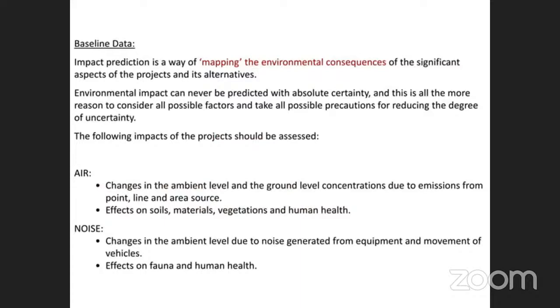physically counting the number of vehicles passing through the project area, to provide an estimate of average daily traffic and the passengers through the project surroundings.